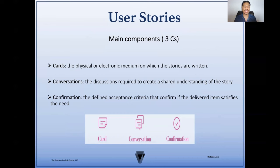The cards are the physical or electronic medium in which the stories are written. So if we are writing them on sticky notes, or electronically in a project management software like JIRA or TFS, this is the card. The conversations are the discussions required to create a shared understanding of that story. User stories themselves are typically high level and don't provide enough information for everyone to be on the same page, so this is where we start collaboration and have those discussions to outline what we're looking for in our confirmation. And then the confirmation is the defined acceptance criteria that confirms if the delivered item satisfies the need.